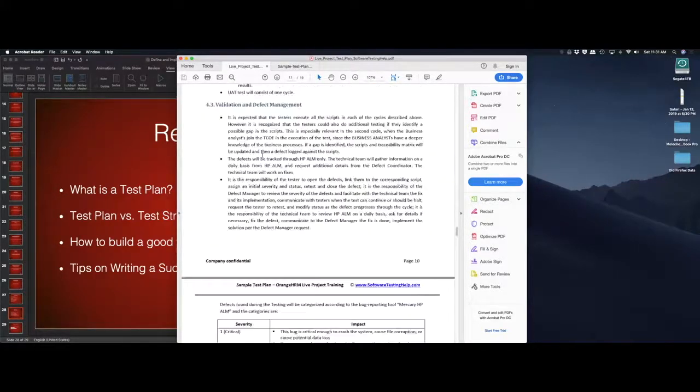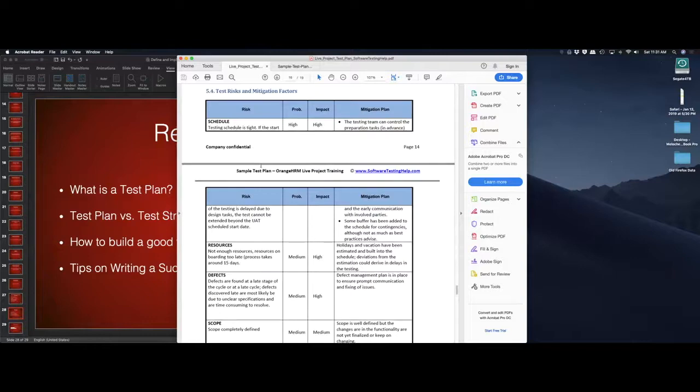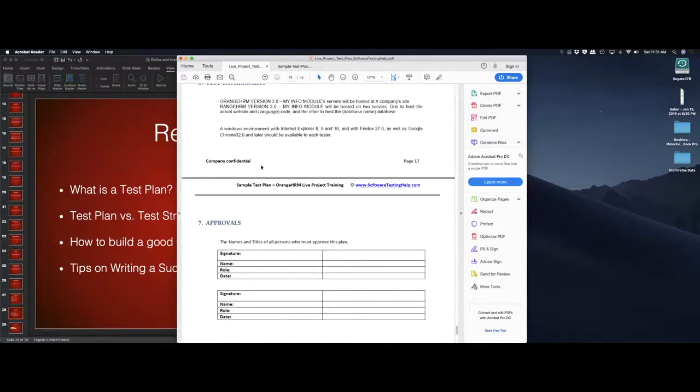So what you essentially need to do is identify, and this is where this document really stands out, that if you know you're going to be able to test everything, so you have a week, you basically set it up: okay, if the code gets to us on time, we have X amount of time to test, and these are all the things we need to test and will test. If that slips, and you can't slip the delivery time, you need to then have a secondary test plan in place of what you will forego in testing and what is acceptable not to test, or basically what is the acceptable risk that the company is willing to take, and then you build a test plan for that for the shortened test period.